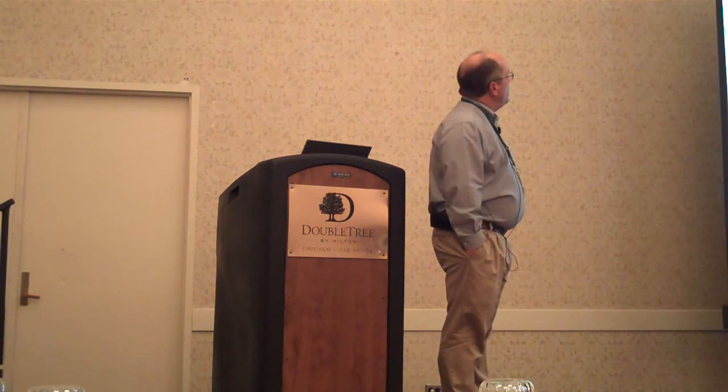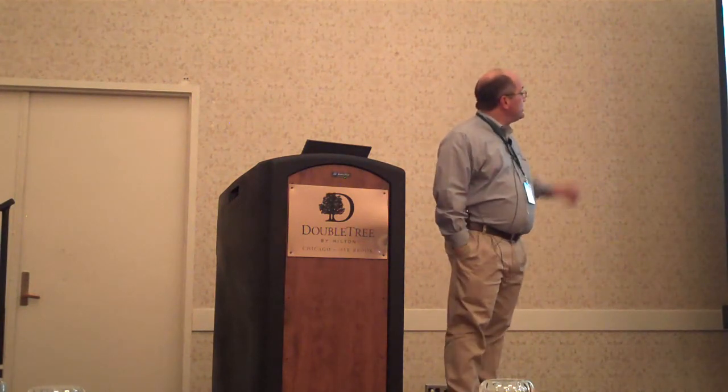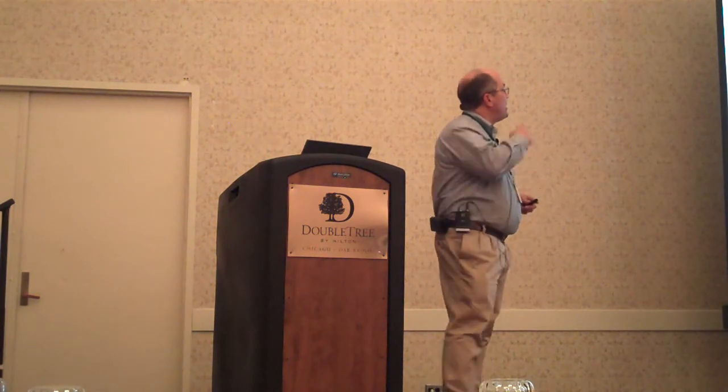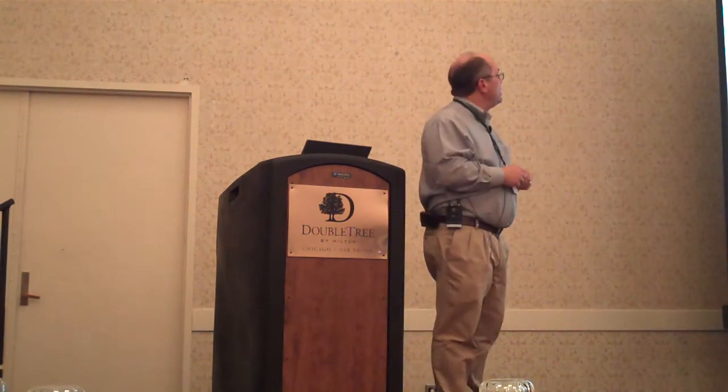There's a couple of things that I'd like for you to see, and that is way in the background over there, you see a card wall. And one of the first things the team was doing before Project Server was installed was managing all the user stories on this card wall. Notice that there's stripes, there's buckets, and the cards would progress across this card wall, and they were using these index cards. That was really good. In fact, the teams following this team all picked up this card wall approach to managing Scrum.